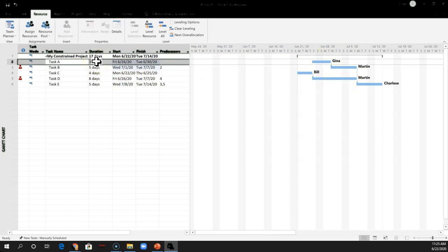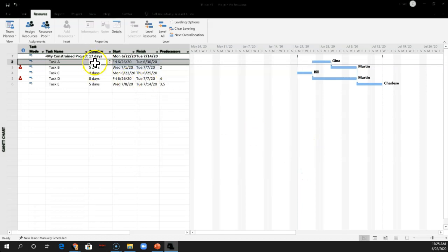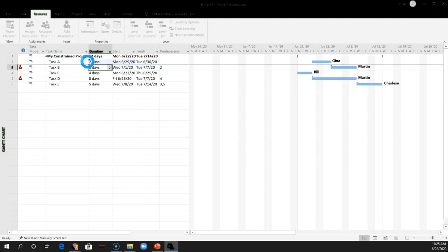That still doesn't quite take care of things, right? So let's add feeder buffers and our total buffer. On this line, we have 3 days and 5 days. So let's halve these. Oops, I want to be conservative here. Let's say we can't quite pull off half. Doesn't like me to do that, apparently. Trying to just do a number. 2 days there. For 5 days, we'll go the other direction. We'll say 2 days here. So instead of 2.5, we'll go 2. 4 days here. It's going to be 2 days now.